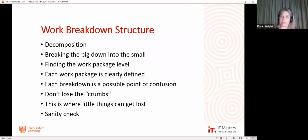Where you've got large numbers of people, it's always the project manager who is the team leader. Particularly in a traditional waterfall project or a PRINCE2 type project where you've got that predictive life cycle approach. It's the project manager, and then reporting up to if you've got issues with individual team members, if you're running a functional structure, you talk to that person first, and if you don't get any joy there, you go and talk to their supervisor or their day-to-day manager and say, look, Karen's on my project, she's not doing anything. I've had a chat to her about it, she's still not doing anything, what can I do?